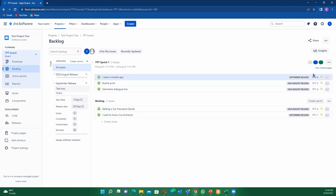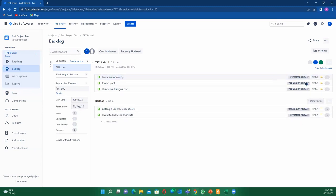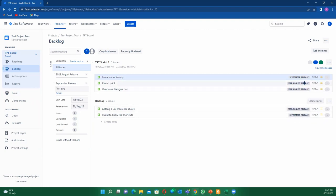To ensure that we know when these stories are going to be released, once you come into your backlog you can see how healthy your backlog is. When we talk about backlog health, we ensure that every story has a release, it has an epic, and it has a story point estimate to prepare you for the upcoming sprint.